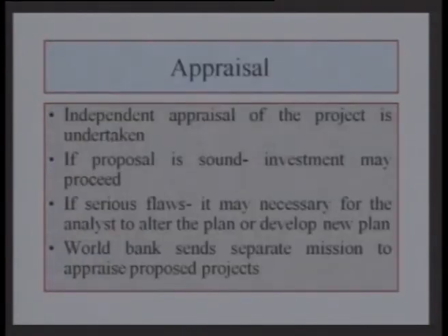The third stage is the appraisal stage, wherein once the project has been prepared and analyzed by the person preparing it, it is then analyzed or appraised by an independent body. An appraisal committee appraises the project, and if the proposal is sound, investment may proceed. If there are some flaws, they are indicated, and one tries to alter the plan and develop a new plan.